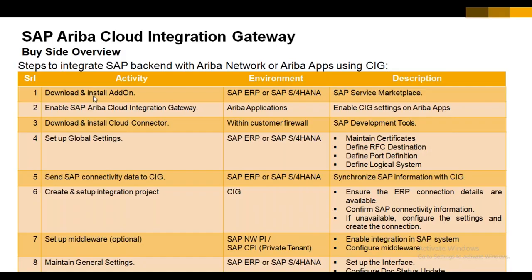No. The SAP basis consultant is required partially, during the beginning only, because he has to set up whatever CIG setup we require; the basis team will take care of that. So we require the basis consultant at the initial stage, full time or partial, and then at a later point we require our ABAP consultant as well, who will take care of some development or implementation of the BAdIs. The ABAP consultant is also required partially, but generally your team lead, project manager, and functional Ariba consultant or functional lead have to work full time on this SCC implementation.